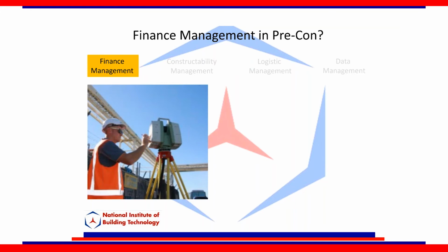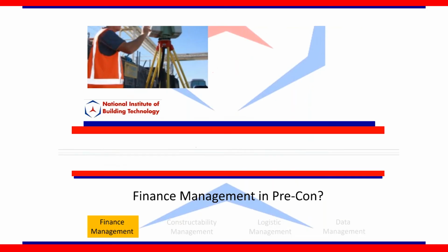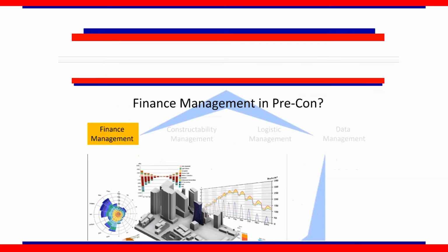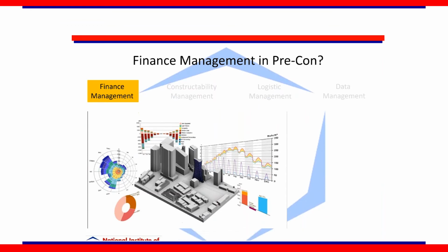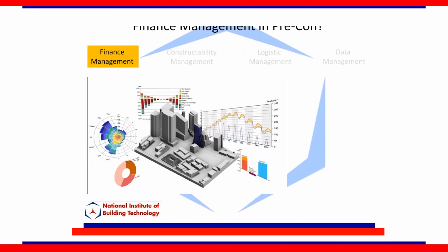So scanning gives you dimensions. It is precise. It is a 3D exact measurement. If you take a measurement in a scan model, it is exactly the way reality is. Photographs and measurements might take you a month to document a project, and you will still get probably 50% of the data. Scanning gives you 100% accurate data in 2 days versus a month. That's how fast and accurate it is. Very important tool. Most clients, when they do a retrofit project these days, say, we want scanners.